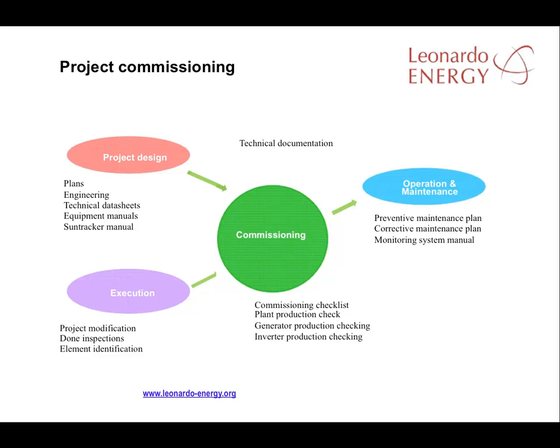The first step in the commissioning process is the creation of a commissioning checklist. Total plant production against forecasts, as well as the production of individual modules and the production of the inverter, are each extremely important.